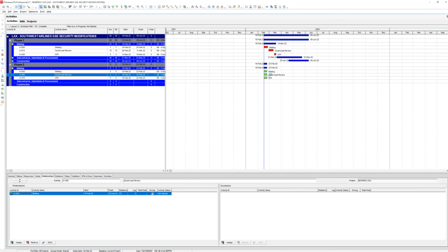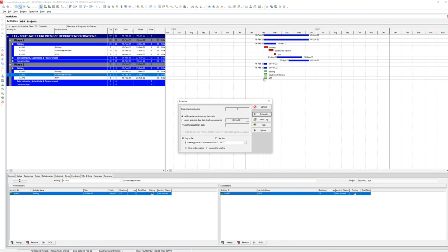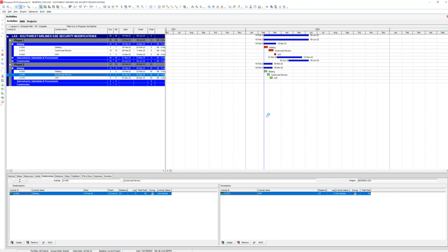Yep. And I'm gonna do the same thing here. Drag it, take it to the front. Boom. And nothing happens, but if you press F9, keep an eye on this area here. Right now they're stacked. I press schedule, it's gonna cascade. Boom. So now they're tied. Right? So we just did that.